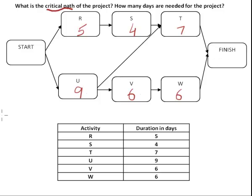Let's write it down. So the first path is start, R, S, T, finish. Second path is start, U, T and finish. Third path is start, U, V, W and finish.